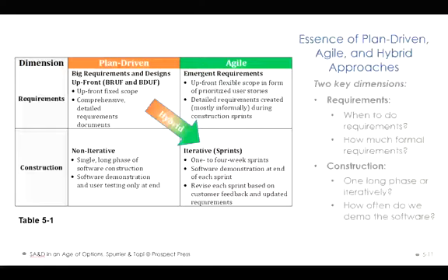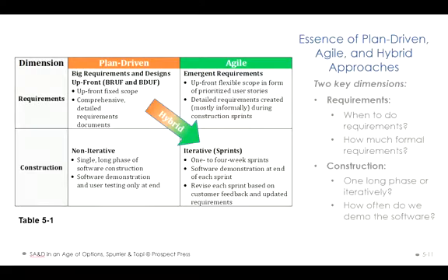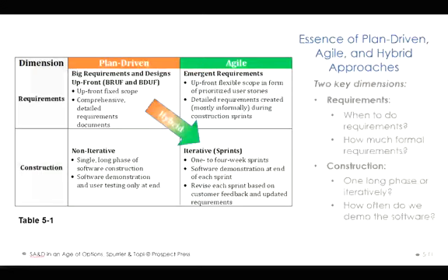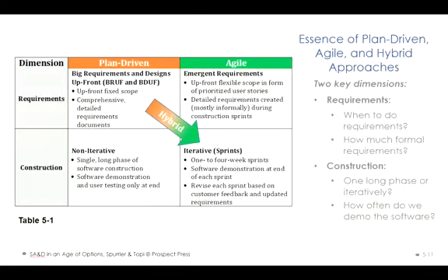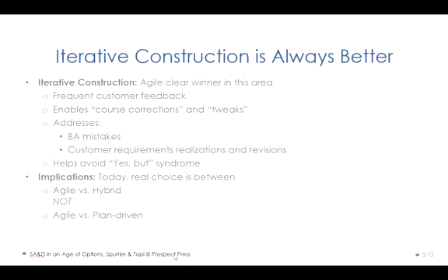Usually, the more rigid your project requirement, and the bigger the project, the bigger the software to build, the more you go toward plan driven. But for smaller requirements subject to change, or a more short-term project, you go more toward the agile methodology side. But all software projects have some similarity.